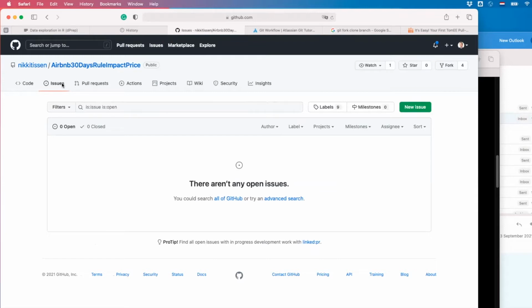Number 2, it makes tasks so small that individual team members can work on them independently and tick them off and get them done. When you meet the next time, you can integrate all the individual parts that you have done and enter a new sprint where you again decide on what are the tasks that you want to work on and what eventually gets solved. I'll show you.